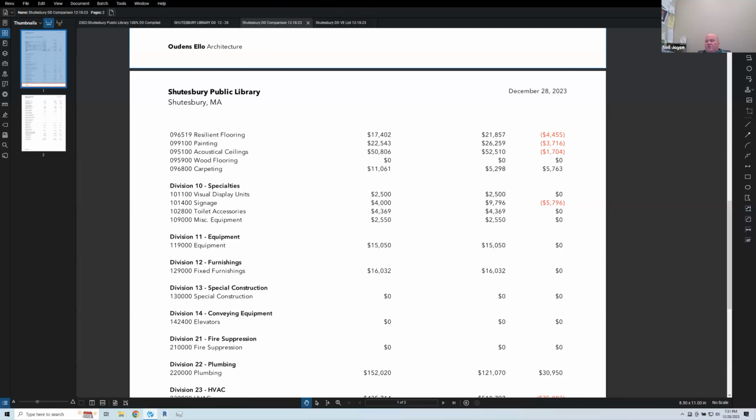So Dominic, the only detail provided in the estimate is 12-inch brushed stainless steel letters, 23 each at $250 a piece, for $5,800. And then at entry, interior and exterior signage at a lump sum for $2,000 a piece. Every door has to have a sign next to it by code. I would assume the exterior signage is some sort of wayfinding on the building to indicate the entrance. That's where the stainless steel signs would have been. Quick $10,000.